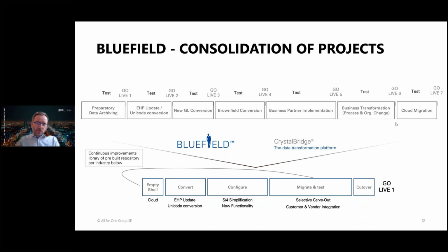Also, the Bluefield approach is fully automatized, which means that we focus on building rules, and we focus on building the mapping rules separately for the export of the data and also for the import of the data. And these rules stay inside of the transformation scenario, which can then be reused for the next test migration phase. Typically, we do 5 test migration phases, starting from the build, followed by test migration 1, test migration 2, go live simulation, and then we reach the go live part.